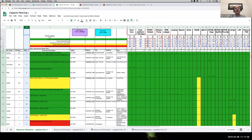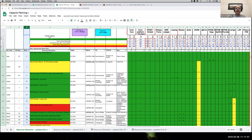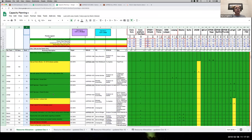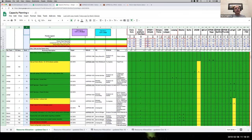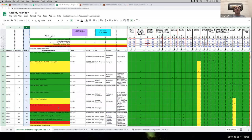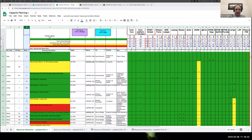Everything that appears in yellow is what we expect based on current known development effort and developers or development teams that we have on staff and work that needs to be accomplished. Yellow represents what's going to happen in the following quarter. And red is a little bit further out. So it would be beyond the quarter after the current quarter. And so many of those, for instance, as we finish this next quarter, as we go through and do our next round of updates, estimates and prioritization, many of those red items move into the yellow slots. In some cases, they even move into the green. And ideally, if all goes as planned, most of the yellow items move into green. And this is how we're able to estimate or provide reasonable estimates as to what we can expect will actually get done or be built.